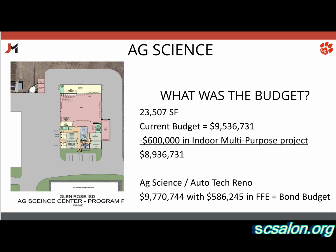Yeah. It was a plumbing code for how you calculate the occupant load of the building. And then when we had the discussion with the city, we said that the maximum gonna be in there per policy was like 300 people. And that enabled us to bring the plumbing fixtures down where it is right now. Any other questions?